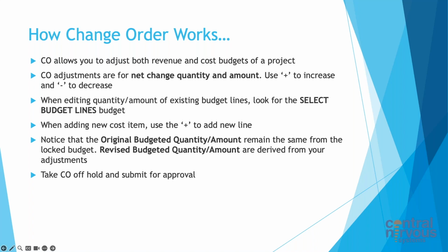Okay, so now that we've talked about pieces of how change orders get created, locking budgets, and workflows, how does the change order work? Change orders allow you to adjust both revenue and cost budgets of a project if you choose. That is something you make a choice on, what you can do on change orders, and that's part of the setup.